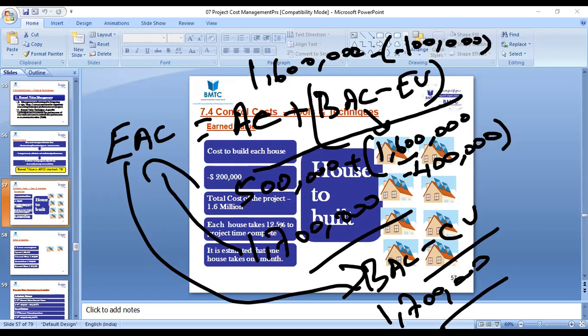Okay, this is the first forecasting formula for EAC. The prediction, you can do a different kind of predictions. So this is a scenario. You will not ask your team to carry forward the remaining work with the current performance. Since current performance is not a good performance, you will ask the people what we plan to do, and you take that for the future work. So the formula will be this: actual cost plus BAC minus EV, right? Or you can go with BAC minus CV, right?